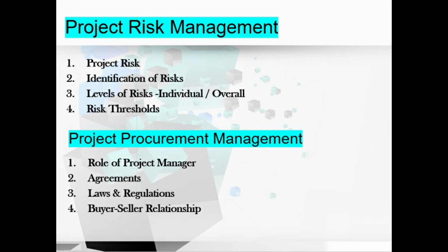And also project risk management processes address both levels of risk in the project. That is, individual project risk can have a positive or negative effect on the project objectives if they occur. Overall project risk can also be positive or negative. And risk will continue to emerge during the lifetime of the project. So these project risk management processes should be conducted iteratively. So this is a key concept, that is the levels of risk.